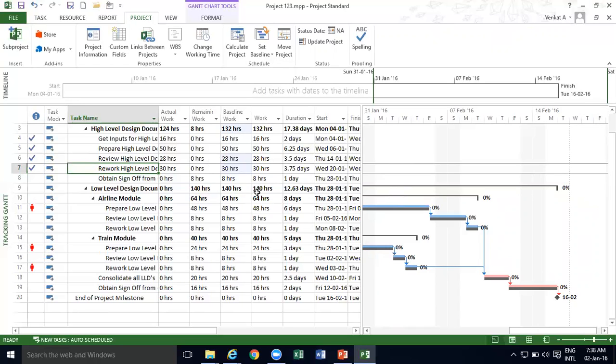And of course, many times it may require approvals. Because once you have baselined your project plan and if you have shown it to the customer or others, they will all say that you have to follow that baseline only. Later on, if a lot of things change in the project, new scope comes and you keep changing this, and you see a lot of difference between what is happening and the baseline, then you can suggest that I can re-baseline the project plan. But basically with approvals, maybe from the customer, saying that okay, we will go ahead with this new plan. So what is going to happen is your previous plan was saying that you will finish on 10th of February. Now you are saying that your new plan will finish on 16th of February. So you are resetting the plan.